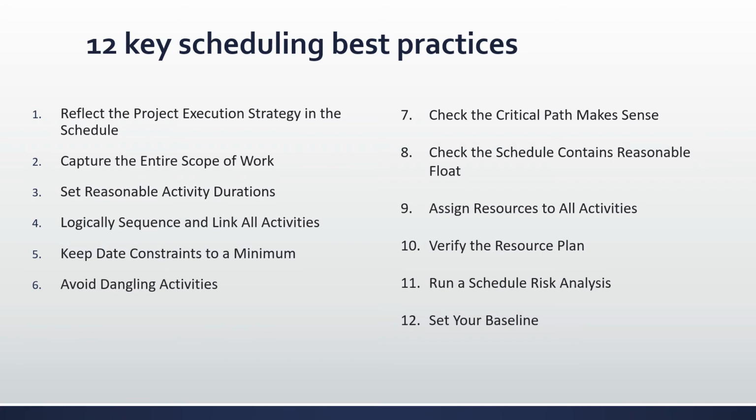The issue with this is that using a negative lag extensively to allow activities to be planned in parallel, and squeezing the required work into an unrealistic time frame to meet project milestones, results in a less reliable schedule. And what's more, if the duration of the predecessor is shortened, the successor may end up starting before its predecessor. So best practice dictates that when sequencing activities, you should look out for high value lags and aim to have finish to start as the dominant dependency type.